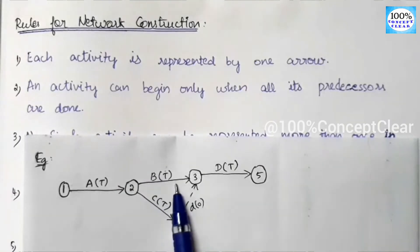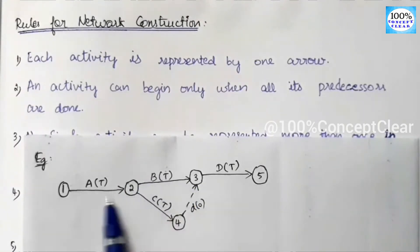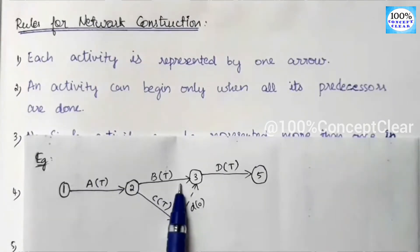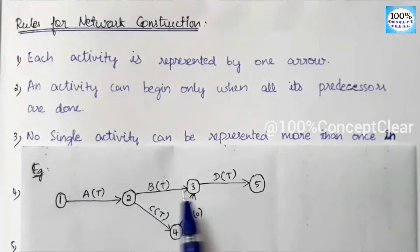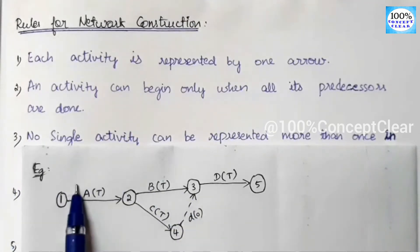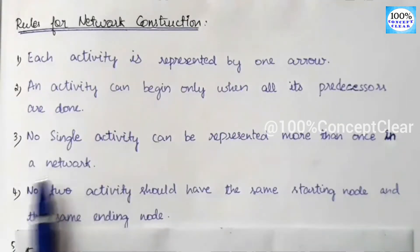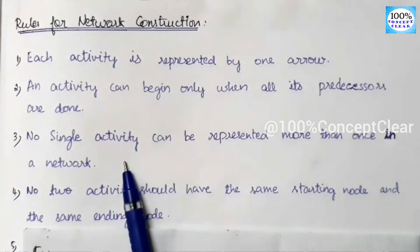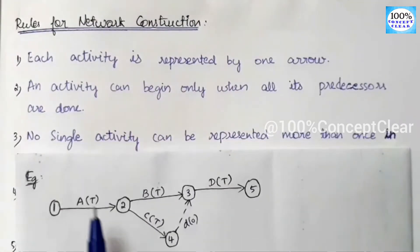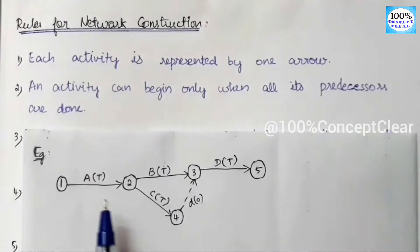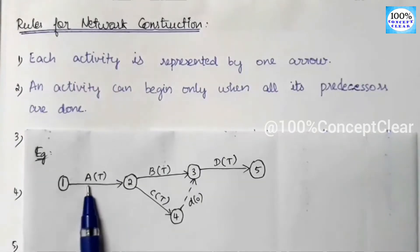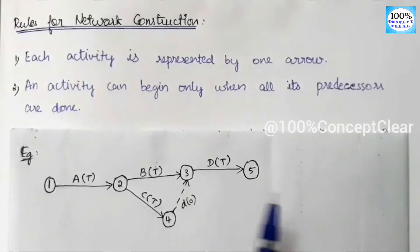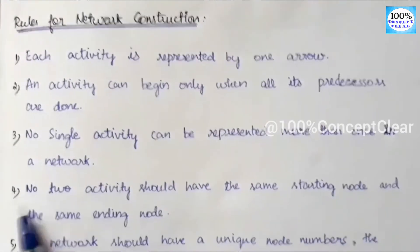So when we start B activity, we must start A activity first. When A activity is complete, then we start B activity. The third rule is: no single activity can be represented more than once in a network. In the network diagram, we can represent one activity only once.